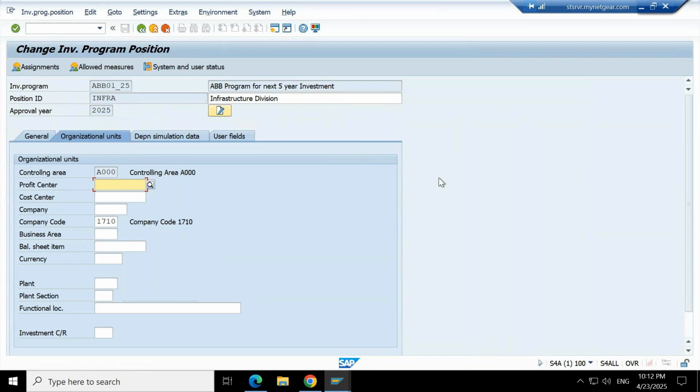In a customer project, there is a different cycle where we go without investment management. In a customer project, we are not doing any pre-investment analysis. We are not allocating any budget for it, right? That has to be financed by the customer. So here is the case where we understand what is the proposal to do the investment, and what is the budget we are going to approve internally to do the investment. So we are creating a basis, and based on that, all planning, budget controlling, everything will be managed. Okay. Understood. Yeah.